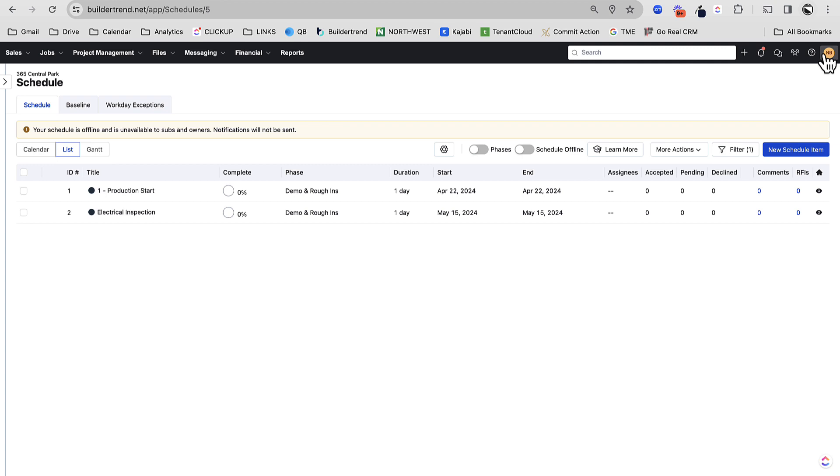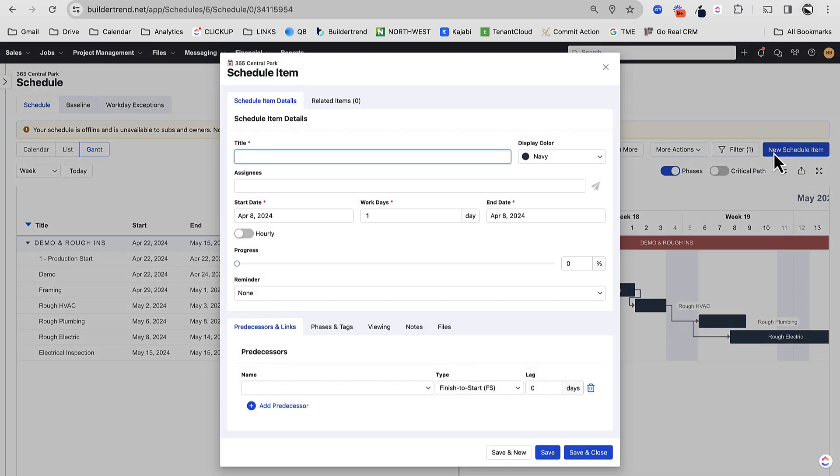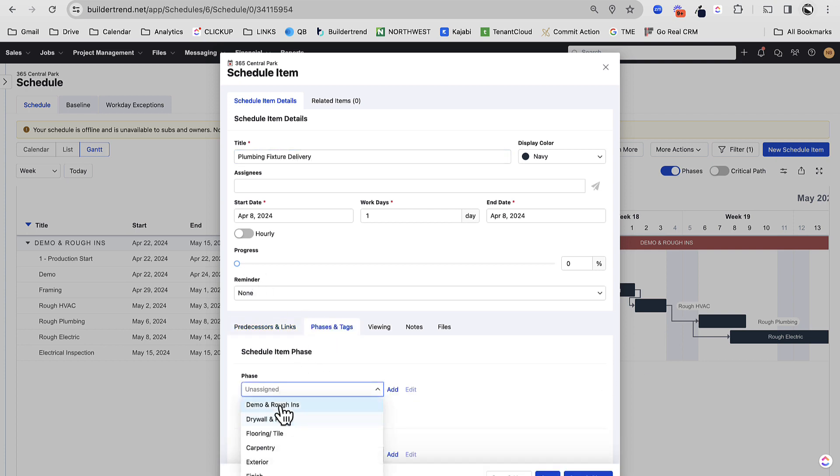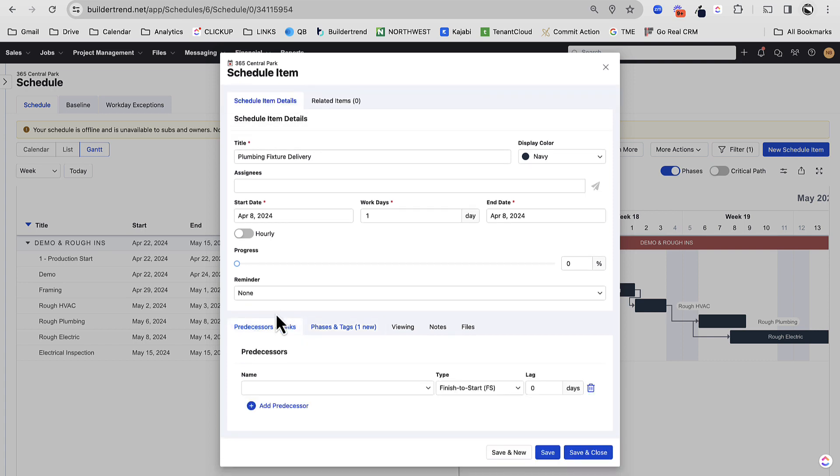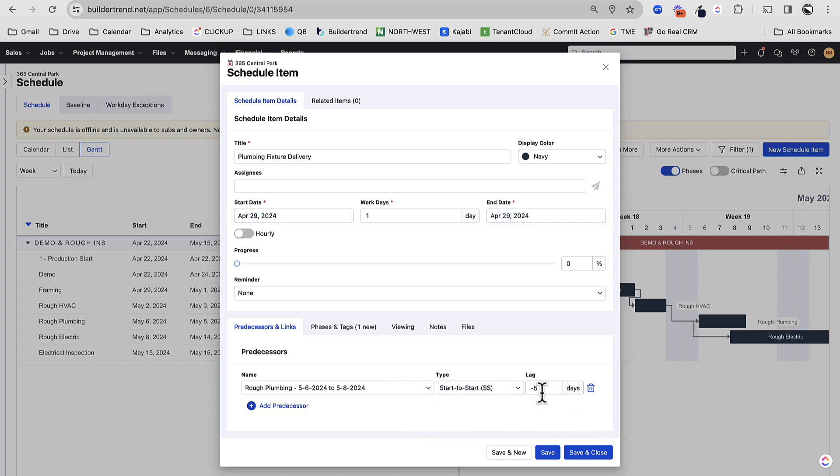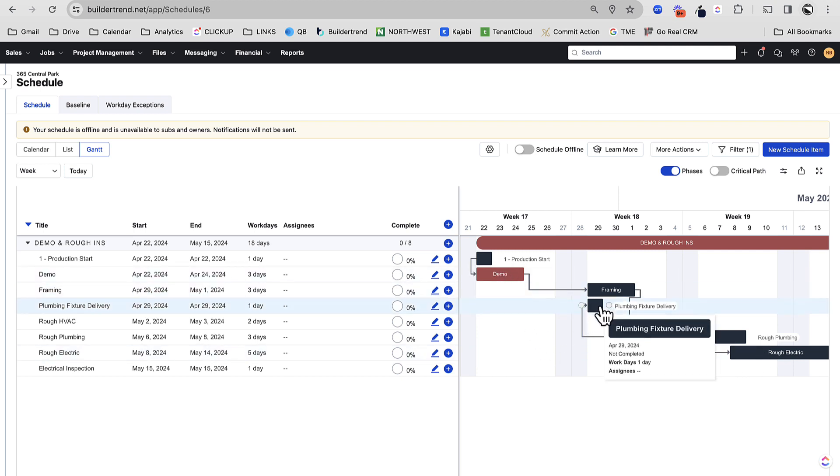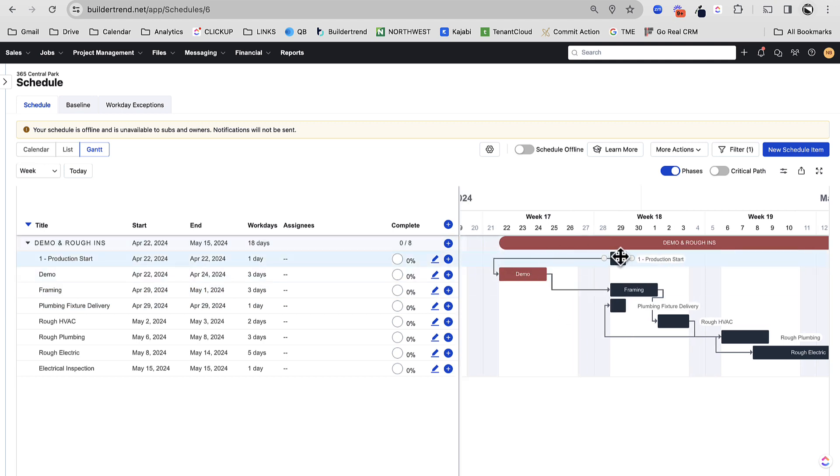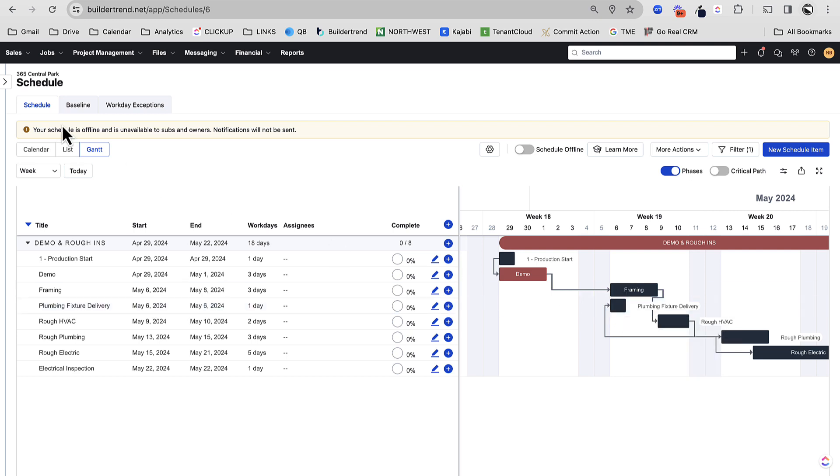So rough plumbing starts this day. I'm going to need my fixtures a week early. Let me demonstrate that for you. Let's go to the Gantt. Let's just create a new schedule item. Let's say plumbing fixture delivery. And we're going to make this demo and rough ends. Tag is going to be milestone for now. And then we'll go predecessor is rough plumbing. So we'll do a start to start minus five work days. Let me save and close that. And so that would tell me that I need my plumbing fixture delivery five days before plumbing. So I can tell my designer, whoever I'm getting those for, hey, April 19th today, if and when my production start moves out, I can say, oh, nevermind. May 6th is the date. And we can give them that list. So you can see why these dependencies are so powerful. So important.